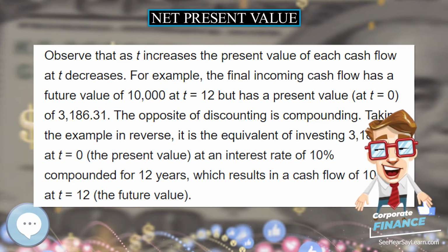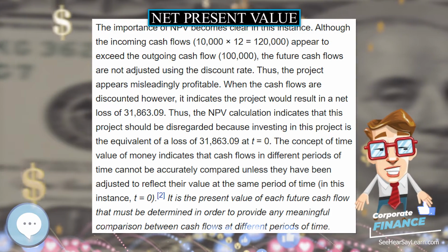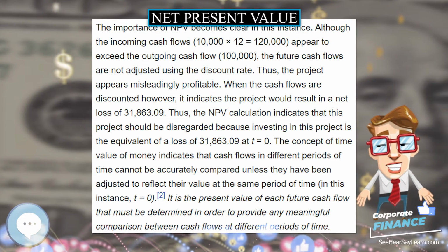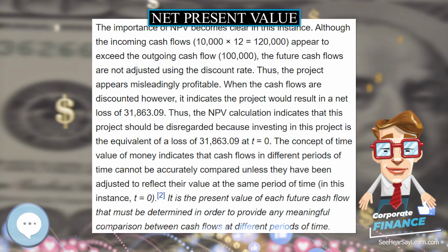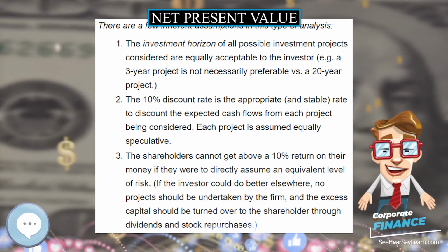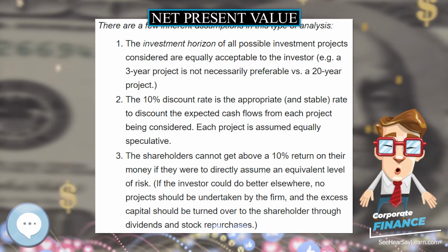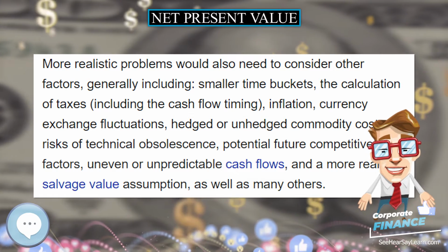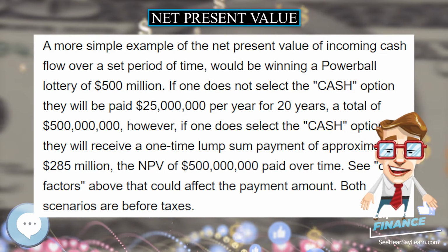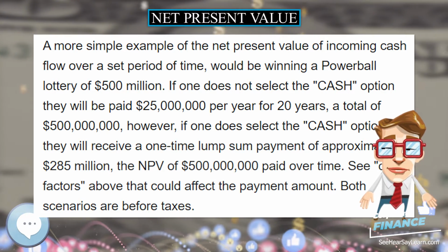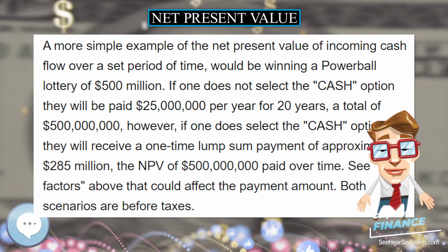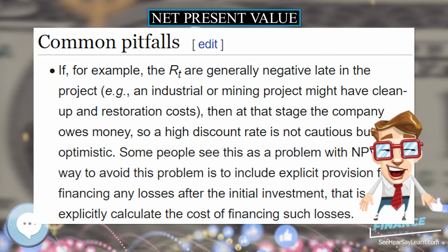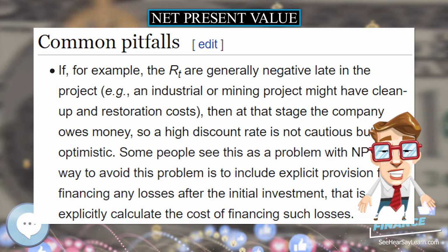A typical capital project involves a large negative cash flow, the initial investment, with positive future cash flows, the return on the investment. A key assessment is whether, for a given discount rate, the NPV is positive, profitable, or negative, loss-making. The IRR is the discount rate for which the NPV is exactly zero.